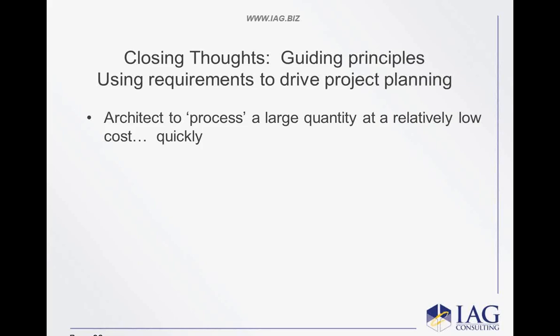In this case, I've described a process that for a $2 million client-side spend, meaning they're going to spend $2 million to build it alone, not just implement, but build it, is going to be like 2 to 4 hours of overhead on the business. That's not a lot, okay, on an idea that could move forward. You've got to set standards in the workflow that always, always, always work.